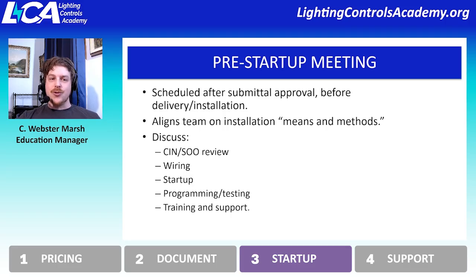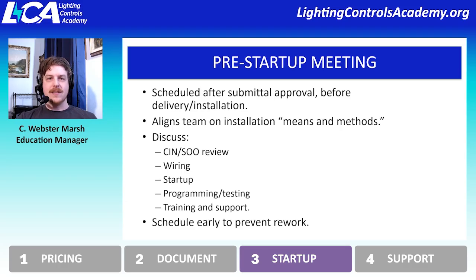Then finally, there's training and support, making sure that the end users are trained appropriately for the system. And having this pre-startup meeting is really crucial. So having it scheduled early, oftentimes even right after my approval for the submittal is sent out, I'll send out a follow-up email saying, hey, we should have a meeting to go over this submittal just to make sure that everybody understands what's expected from the system.